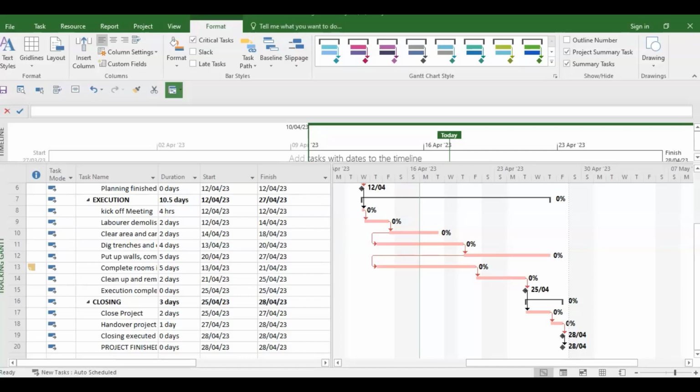Now, there may be times when, having completed your project, you realize that the schedule is too long and you're looking for ways of shortening the schedule. One of the ways is to look at the critical path activities. You may determine which ones could be done in parallel, which ones you can put a lead on, so that instead of having a finish to start relationship, you start a little before the previous predecessor finishes. You can even revisit your scope to see if any adjustments could be made and things that are not critical to the project omitted, so that you can bring the project online in terms of the schedule, the deadline by which the organization wanted this project to be finished.